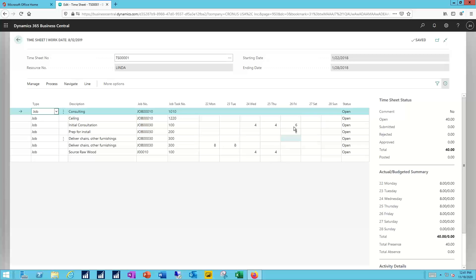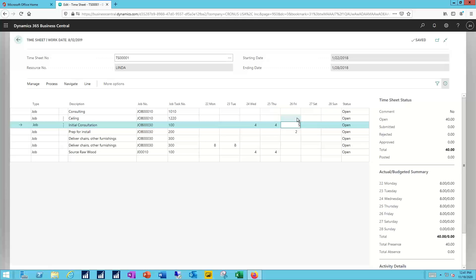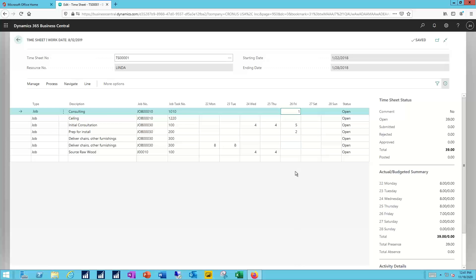And maybe she's sent me an update to let me know that the initial consultation only took five hours and that allowed her to spend some additional time doing consulting work. I can go in and put that time. Over on the right hand side I can see the time sheet status and the total hours entered against budgeted amounts for those time periods.